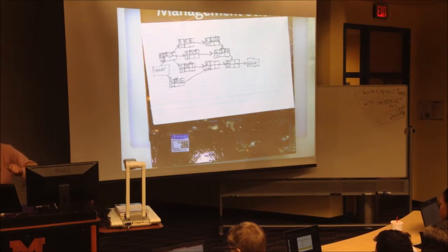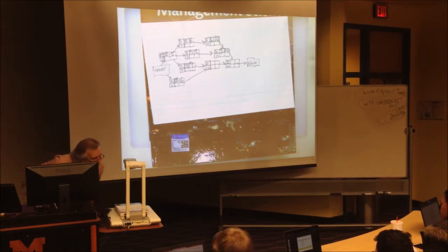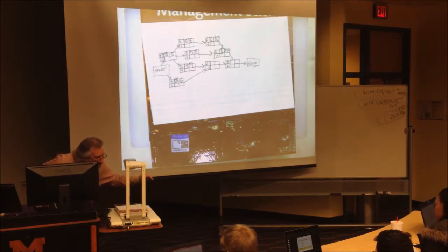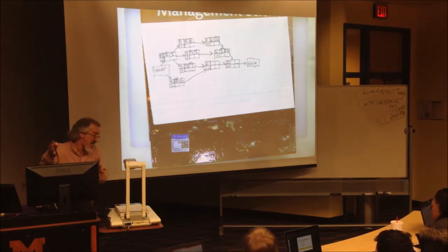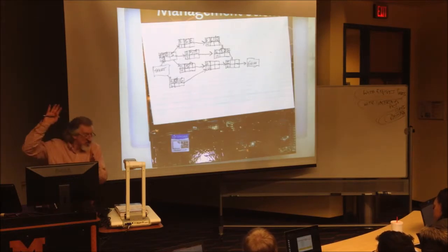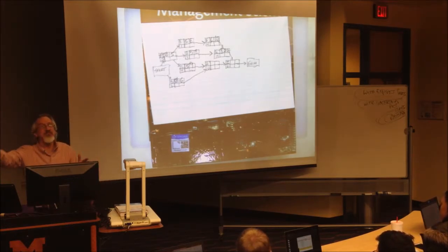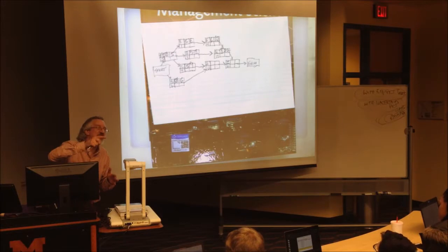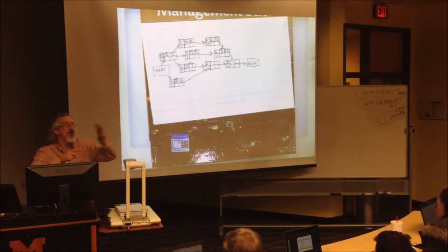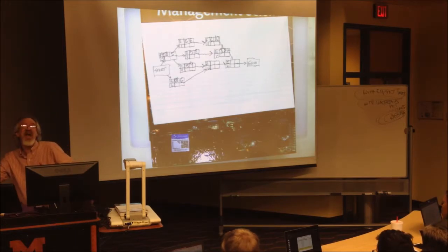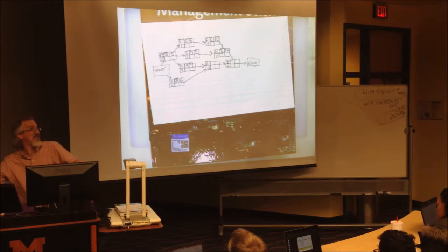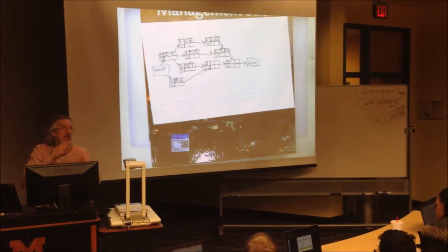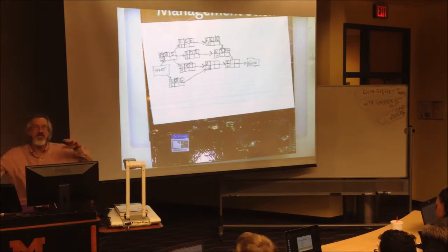For example, H is preceded by C and B. C can't get done until day 9. B gets done on day 6. There's no way H can start on 6 because both of them have to be finished. So you use the larger number going forward. I'm emphasizing this because when we go backwards, it's the opposite rule. When we're going backwards, the rule is the smallest number. Going forward, the largest number, when you have more than one activity, either after or before.